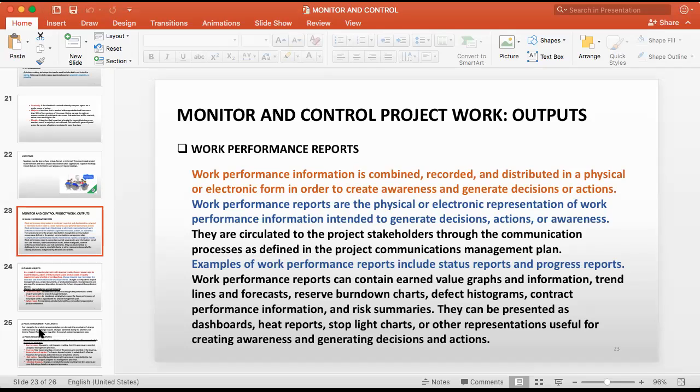If you are a developing organization, you have to produce these reports in time. That is, you have to be very strict on this one. You have to have all these graphs, your trend analysis, your S curves, lot of things you do, and your risk registers, the risk you have, your grievance reports, all these are attached to this report.